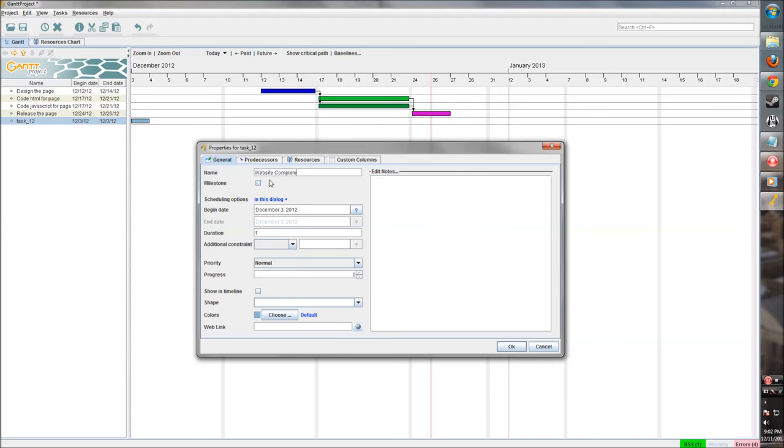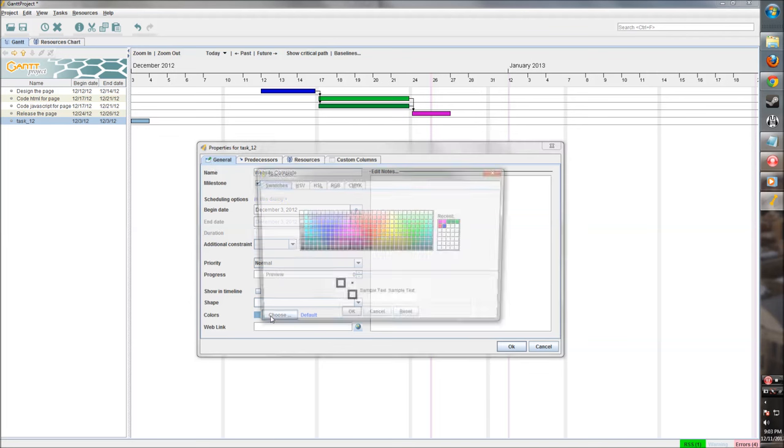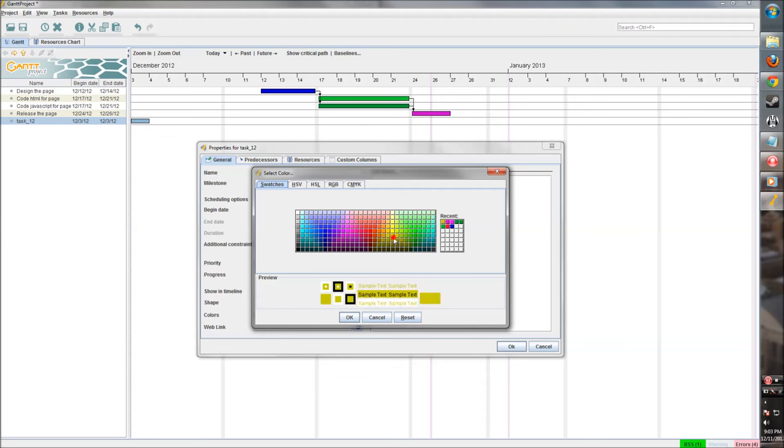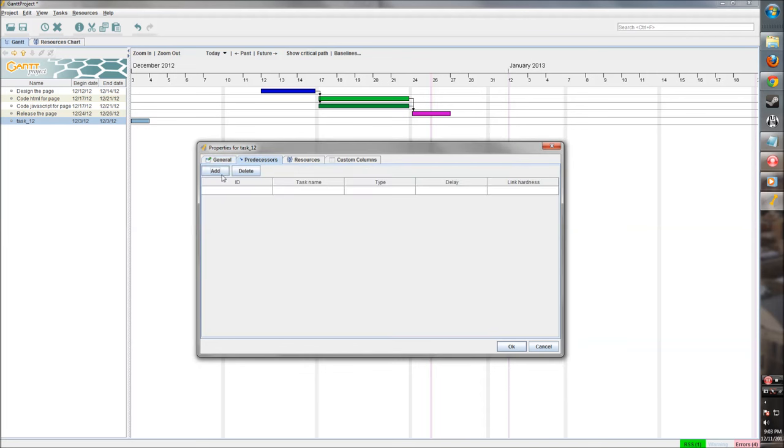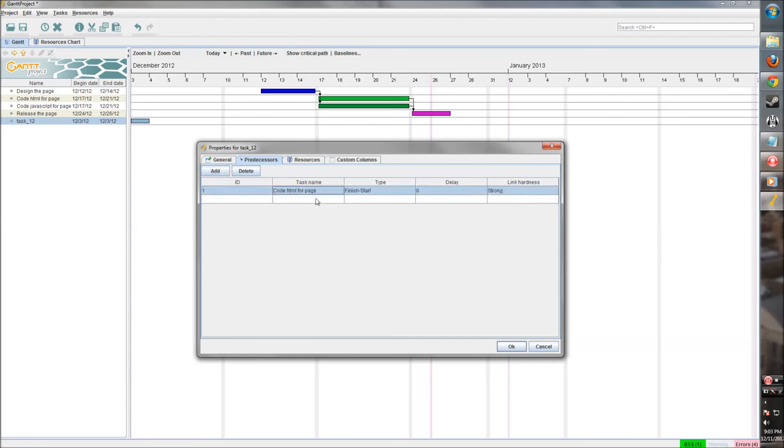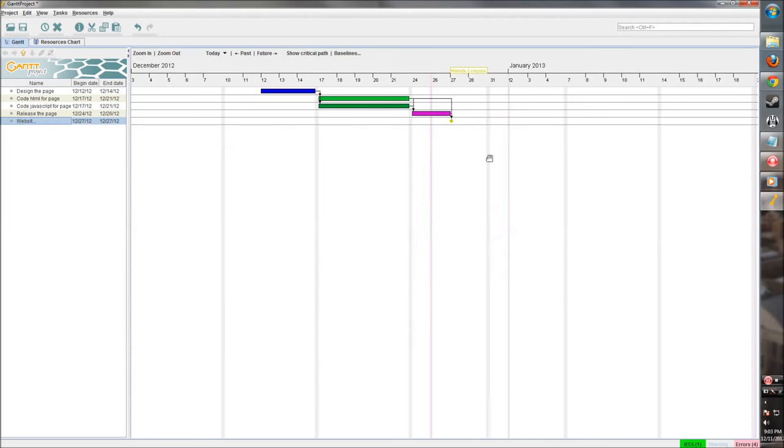So let's say this is website complete. This is what we're working towards. That's going to be a milestone. Let's make that gold, like a gold medal. That's what we're running towards. And this needs to be done after the release. That's where we want it. So there we are. That's our milestone that we're working towards.